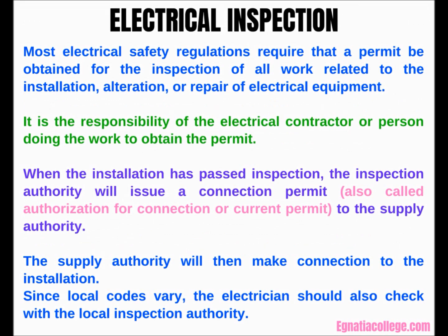Electrical inspection. Most electrical safety regulations require that a permit be obtained for the inspection of all work related to the installation, alteration, or repair of electrical equipment. It is the responsibility of the electrical contractor or person doing the work to obtain the permit.